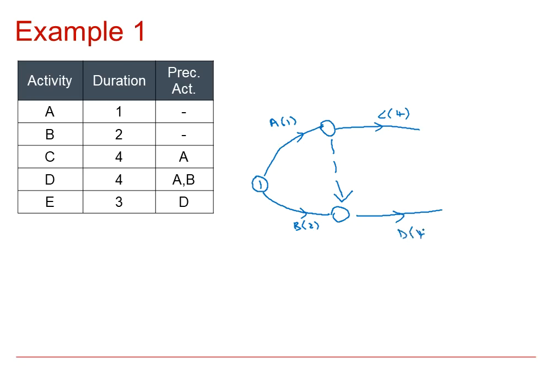So if we just stop and check this. We can only travel down a dummy. You've got to follow the arrow. So C only follows A as required, but D follows B, and because of the dummy, it also follows A. So D follows A and B, C follows only A. And to preserve the order of the nodes, that would need to be the second node, and this one at the bottom of the dummy is the third node.